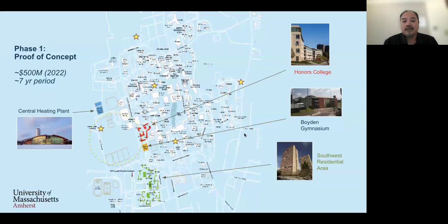In addition, we learned that our largest open field that we had to establish our Geo-Exchange well field, which is highlighted in the dotted yellow circle there off to the west of our campus, that's our largest athletic field there, would really only support the 30 or so buildings that were identified in this proof of concept study, that analysis that we did.